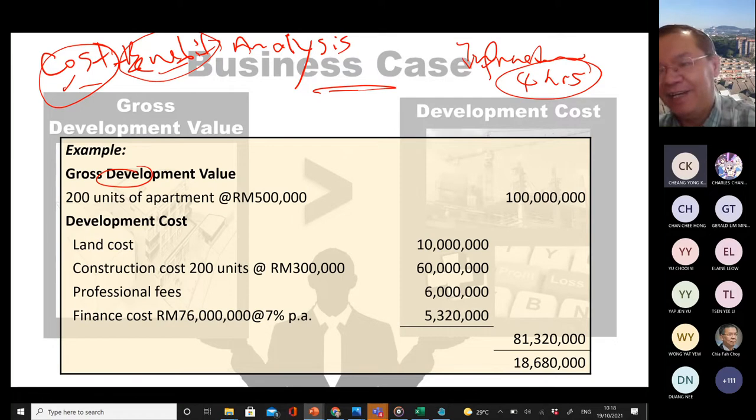And then for each trip, they can save 4 hours. Let's say you have 100,000 vehicles moving from one place to another. So they are saving 4 hours. 4 hours multiplied by 100,000, that is 400,000 hours saved. So with that time saving, you can convert it